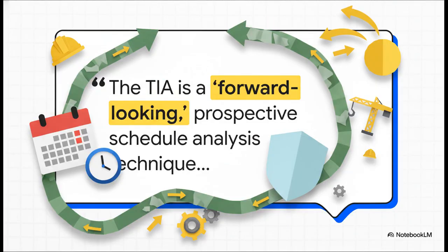And that really brings us back to the most important principle of the TIA, highlighted right here by AACE International. It is a prospective or forward-looking technique. This isn't about looking back months later. It's about showing the likely impact of an event based on the plan you had at that very moment. And that is what gives you a clear and timely basis for your claim.